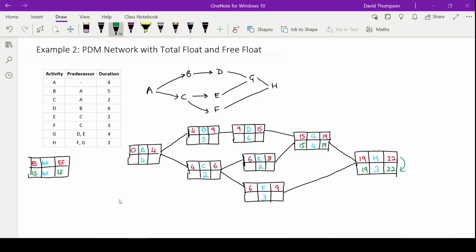That's good. So we bring the 19 back down here then. So 19 minus 3 is going to be 16. So that means the latest start time for activity F is going to be on day 16. And we can't fill out activity C yet, because you can see there are actually 2 nodes going into activity C. That's activity E and activity F going in. So we have to figure out what the latest start time is for E first of all. So we'll go back up.